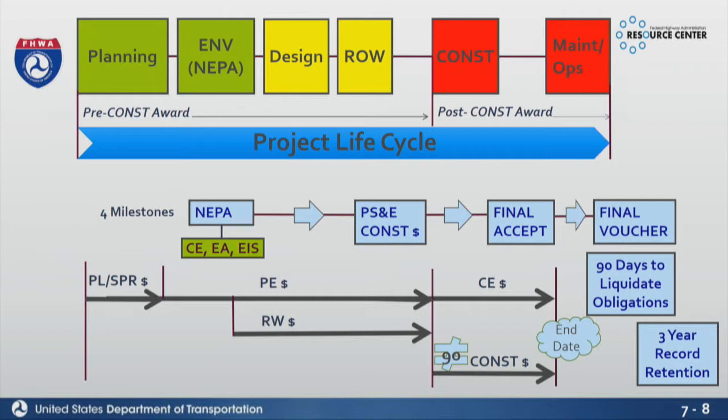As long as you have that determination and that's your final decision, then we don't care if it doesn't go to construction. When we talk about the PE 10-year rule, though, is if NEPA did say, hey, we can do construction, and you just choose not to do it, then you may have to pay back those funds, those design funds. That's what that PE 10-year rule is. If we are still in design or in the PE phase for 10 years, you have to justify why that project didn't move to construction. And if it didn't move to construction and your justification is we just decided not to do it, then you have to pay us back any federal dollars that we participated in that.